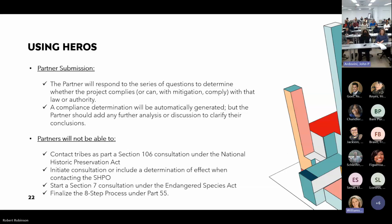Let me jump in, Kara, just for a second. So this is a critical piece. And this will be something that as we continue to train the grant loan specialists on, this is why it's important to get the SHPO and TIPO pieces going, because there are a lot of consultants out there that think that they're quote unquote doing their client a favor by starting the SHPO TIPO process when in fact they cannot. And so it's oftentimes misunderstood by the ownership group that they think, well, what do you mean I've got to do SHPO? We already did that. No. HUD itself has to initiate these.